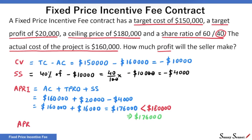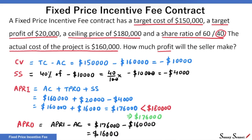Actual profit is simply actual price minus actual cost — that is $16,000. With this, we have solved the problem. Still, for better understanding of FPIF contracts, let's compare the actual price and profit to the target values. The seller got a profit of $16,000, while the target profit was $20,000 — the seller ends up with $4,000 less than that.